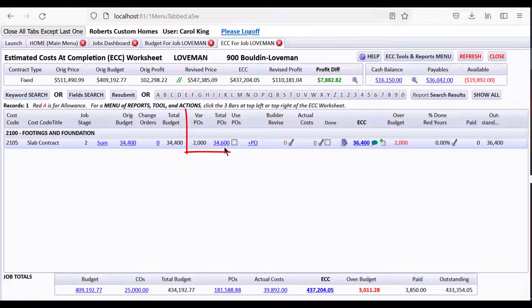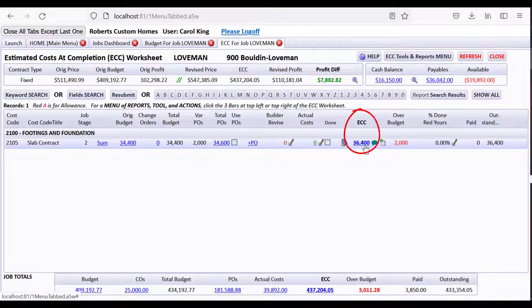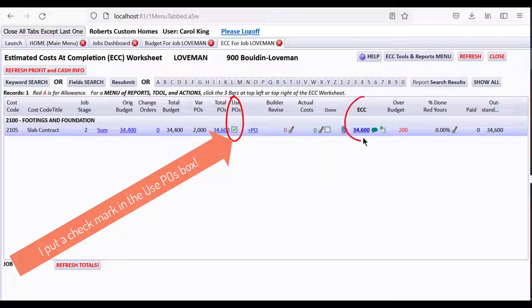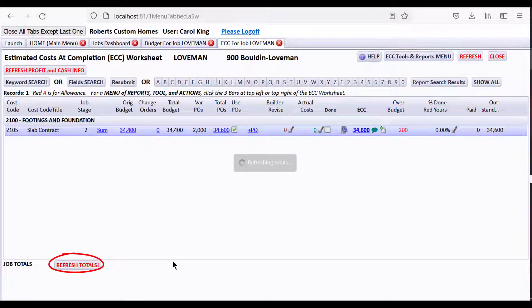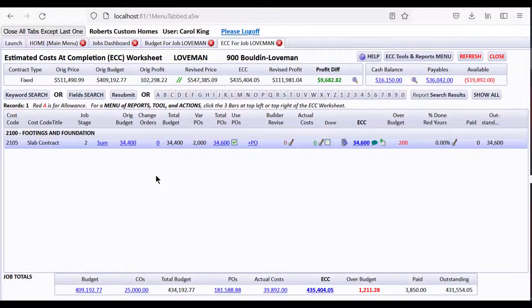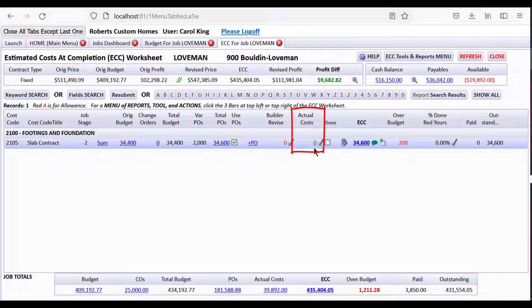Let's get back to the ECC. We drilled down and saw we had done a PO for $32,600 plus a $2,000 variance PO, giving us $34,600. I don't want the estimated cost at completion to be the budget plus the variance PO anymore — I want to use the PO amount for my ECC. Now it's showing I'm over budget only by $200 rather than $2,000, because the PO we issued is $1,800 less than the bid, and then we issued a variance PO for $2,000. We'll come back to this line and refresh the totals to see how our bill shows up as unpaid payables and in the cash balance.